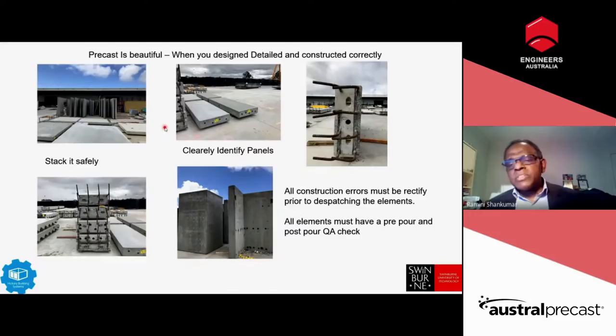If you send it out and they have to rectify on level 45, you think about their problem, the safety of those people who are rectifying on site. So like a pre-pour inspection, we must have a post-pour inspection and rectify before dispatching them to the site.